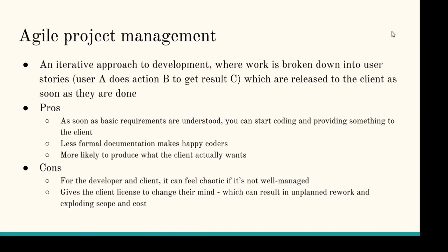In Agile management, it's an iterative approach. What that means is we break the work down into small pieces that can be done in a small period of time, generally in less than 2 weeks. Sometimes, depending on the scope of the project, it could be things we can deliver within 2 days or within 1 day. Then we do all of the parts of the process that we looked at: design, develop, review, test, release, on each of those small pieces.